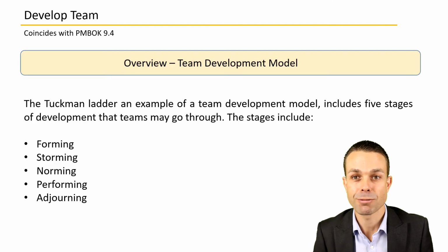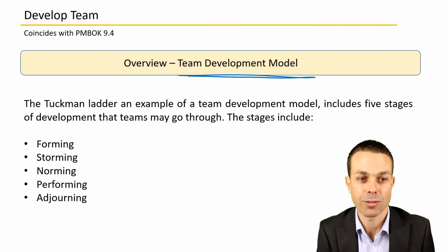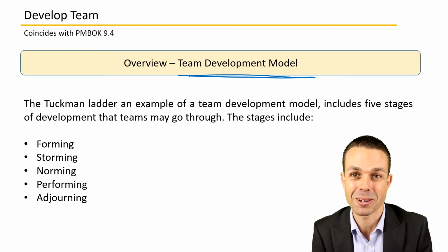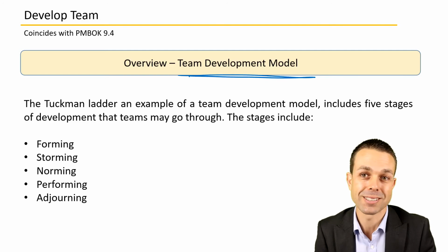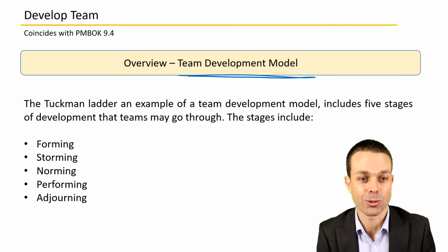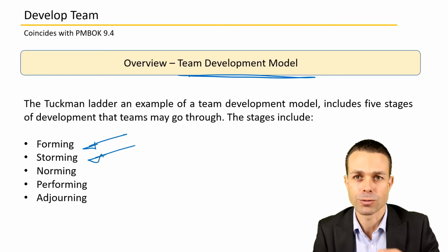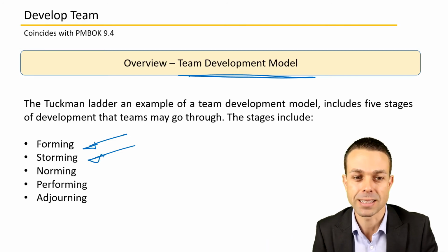We'll also see for the first time the team development model of the Tuckman ladder from Bruce Tuckman, where the teams will usually go through these stages. And because a project team is temporary, it's a temporary endeavor delivering business value, you'll often go through these stages as part of your project management career, where first we're forming the team, and then we're storming, now we're sort of everyone's still working separately. They're trying to find their place in the team.